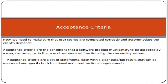Acceptance criteria are a set of statements, each with a clear pass or fail result, that can be measured and specify both functional and non-functional requirements. For example, if the requirement is that a customer must enter a user ID and password to access the application, the acceptance criteria would be that the customer must be logged in successfully when they enter the correct ID and password. That is what we think of as acceptance criteria.